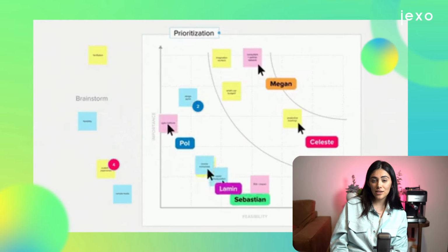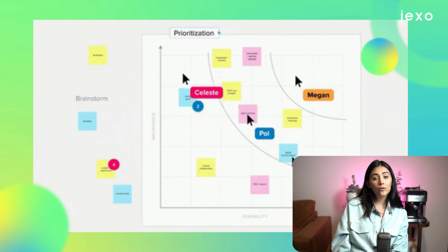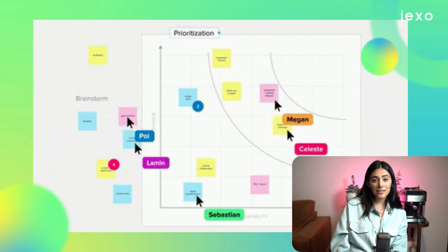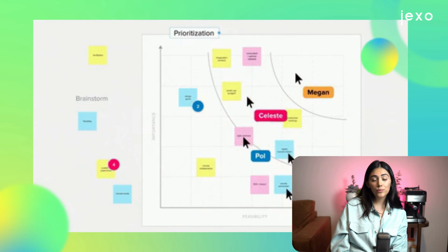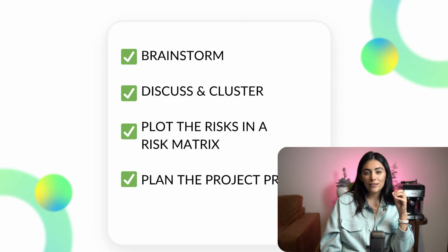One fear that persisted long was not getting enough attendees, so we held another brainstorming session with the team, where we went over all the efforts and tasks we were working on to promote the event. We found new opportunities we had overlooked. So this is why coming back to your whiteboard is important, because even if you are the best at planning, situations can change, and you have to be on top of that at all times.